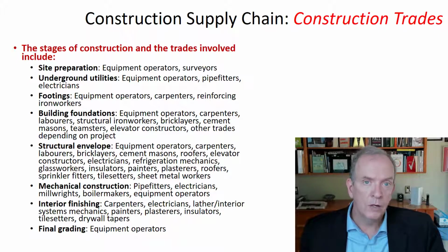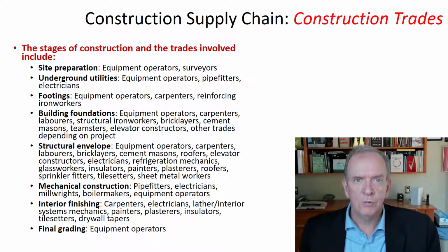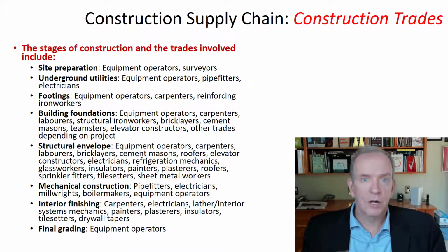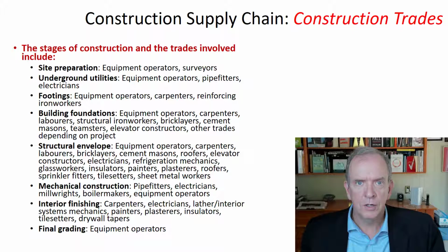So we have to run wires to the door, and who's hooking up the wires then to the hardware, and who is making sure that the connections that are made to the hardware can talk to the building automation systems, because high secure areas like airports and things like that, that has to work and that has to be integrated. So there's a lot of trades that can be involved in just the simple putting together of a door process, much more than in the past where it was just a carpenter. We hang it, we put the door closures on, and off we go. So just as a simple example.